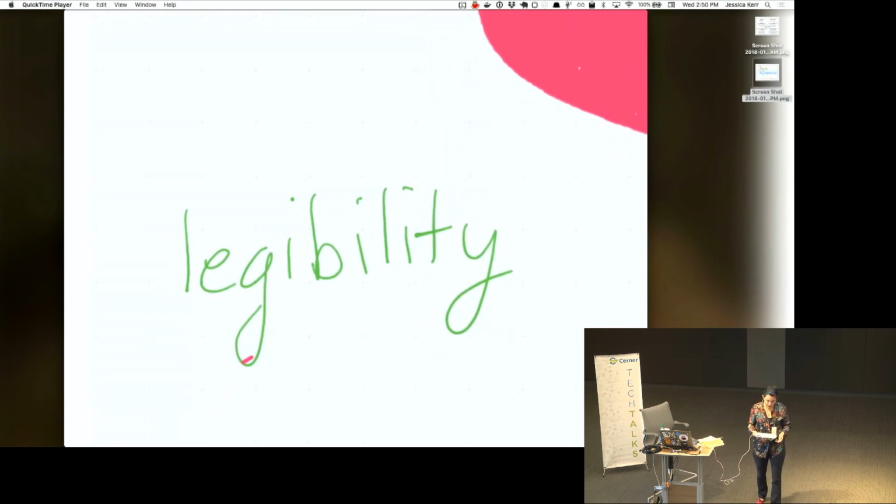Now, in your automations, if you're the one writing the automation and you want a big picture of how your projects are doing, well, one thing you could do is, if you have the organizational power, you could decree that everyone will follow exactly these steps in JIRA when they have made the final commit that represents the feature and they think it should move on to the testing phase, or whatever it is. Or you could make an automation that comes up when they've made a commit and says, are you done? They click yes, it reports it exactly where you want it. And then nobody has to go to JIRA. You get exactly what you want in JIRA.